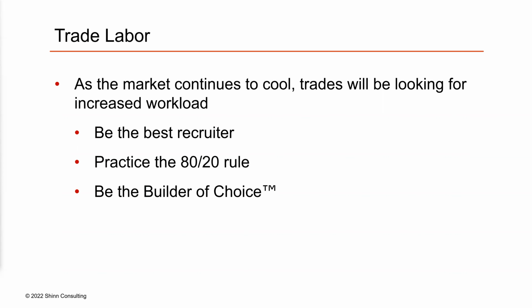One of the things that we talk about all the time is the 80-20 rule. So I never want to give any one trade all of my work. As we consult with builders, and especially recently on schedules, all the problem trades are because that trade has all your eggs in one basket. If anything goes wrong with that trade, let's take what everybody looks at every single night, the lotto ticket. However high it's up to now, my HVAC plumber contractor who gets that, is he showing up to work on Monday? He's not. So I want to think about that 80-20 rule.